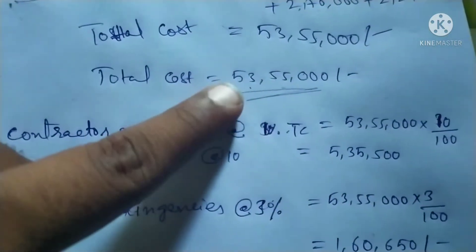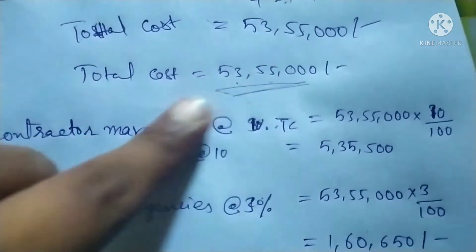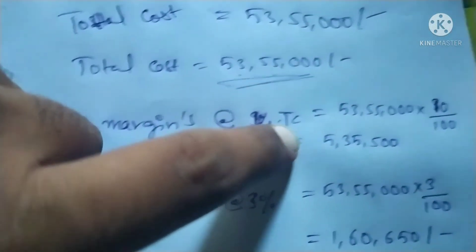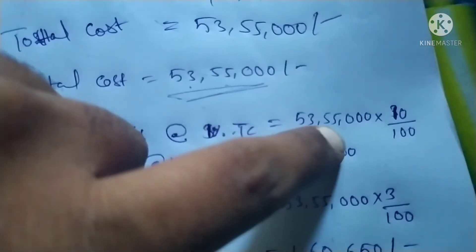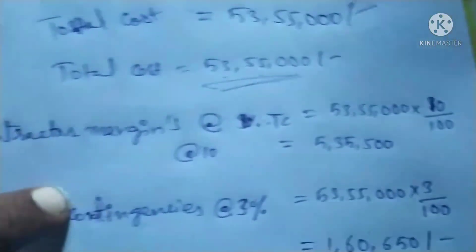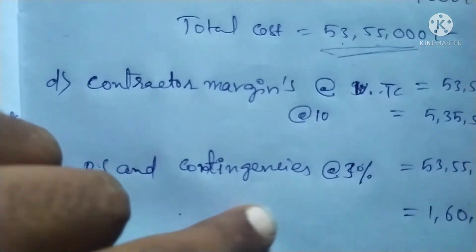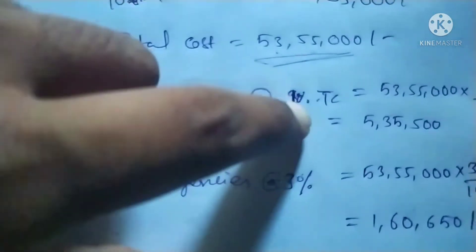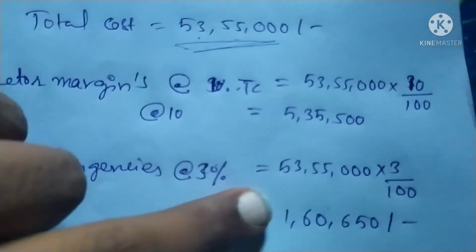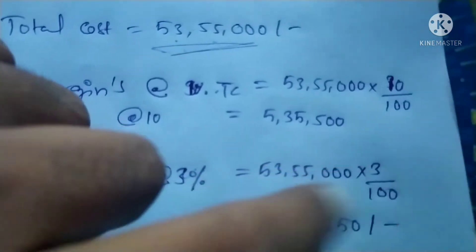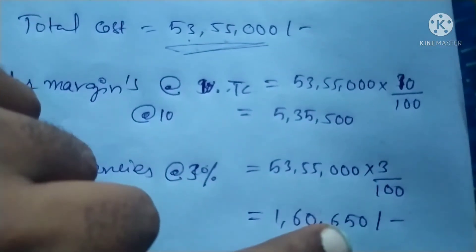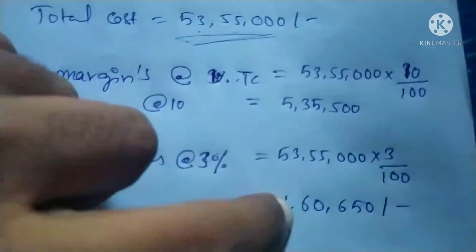Total cost is 53 lakhs 55 thousand rupees. Contract margin is 10% of total cost: 53 lakhs 55 thousand into 10 divided by 100 equals 5 lakhs 35 thousand 500 rupees. PSN contingency charges is 3% of total cost: 53 lakhs 55 thousand into 3 divided by 100 equals 1 lakh 60 thousand 650 rupees.